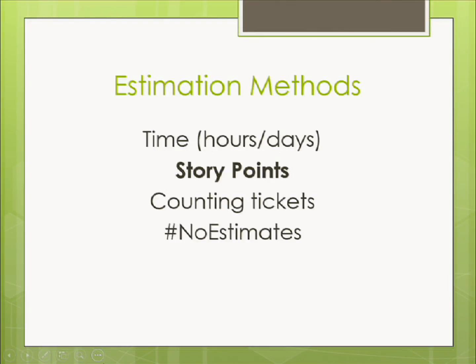and they're going to get assigned a point value this way. So this works better if you don't know the application or the business or the subject matter well. In this case, it's really hard to estimate the actual size because there's just so much you don't know. But it's not that hard to figure out if one thing is harder than another thing. This also helps because, again, I might have a 1 point ticket that I can do in 4 hours, and another guy has a 1 point ticket that takes him twice as long, and his 2 point tickets take twice as long. Well, that relative estimate is still accurate for all of us. Doesn't matter how long it takes everybody to do it.